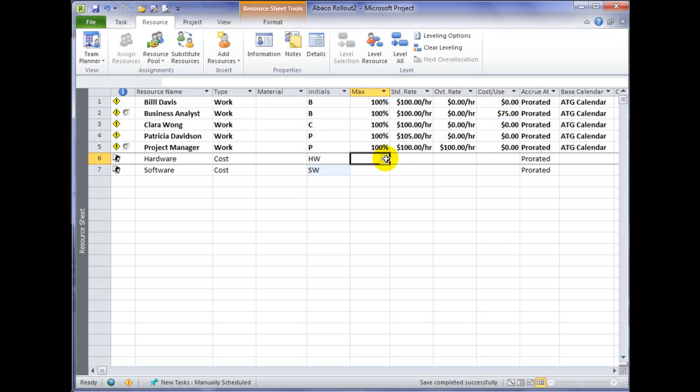If I were to try typing something into these columns, Microsoft Project would not allow me to, because a cost resource doesn't accumulate the cost based on an hourly rate or any rate that's related to time.